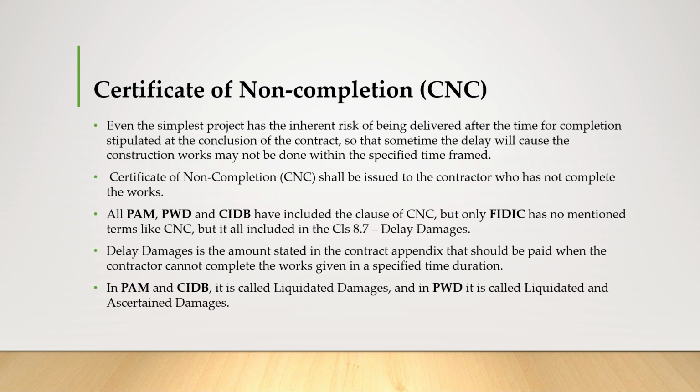Delay damage is the amount stated in the contract appendix that should be paid when the contractor cannot complete the works within the specific time duration. In PAM and CIDB, it's called liquidated damage, and in PWD, it's called liquidated and ascertained damage.